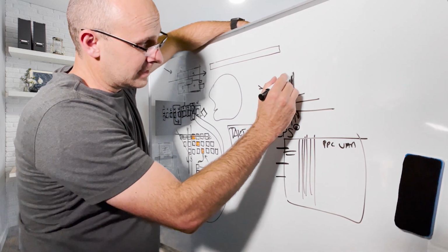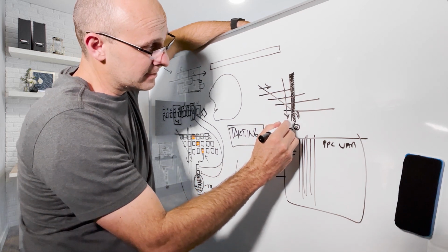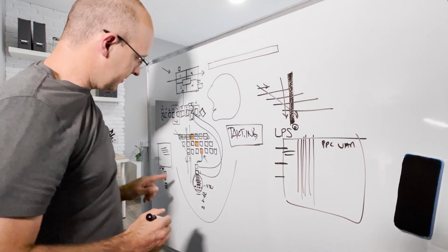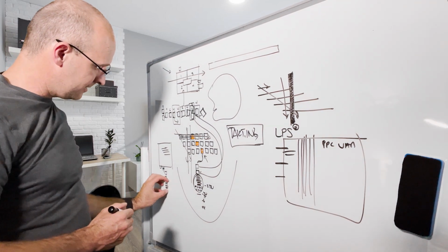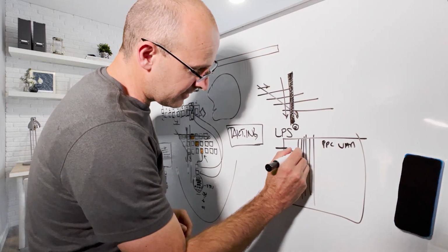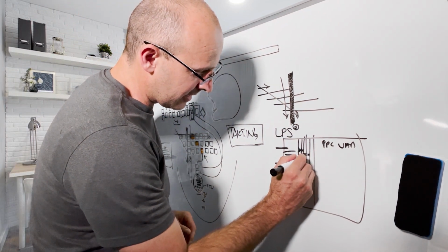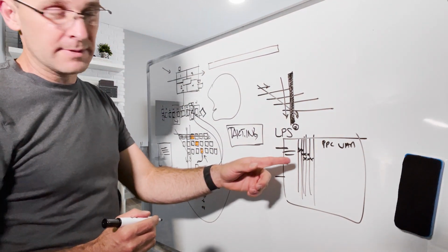Well, not only is it in the overall Takt plan with Takt wagons, but if you're using the Excel template, you can literally go in here and copy these, because that's supposed to happen, and put them in here, and then start to fill out the commitments that week in a time scale if you wanted to. Right? Boom. Last Planner System.